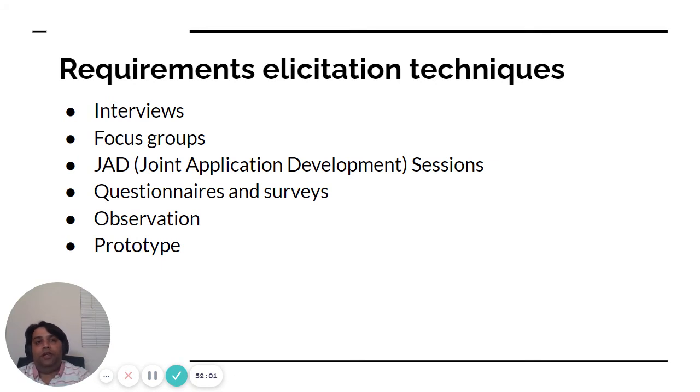So you have to understand the existing system whenever you are updating or enhancing some specific product or service. When you develop a questionnaire or survey or list, make sure the questions are specific and not confusing, because with this tool you cannot interact with your audience. You do not get a chance to ask follow-up questions.